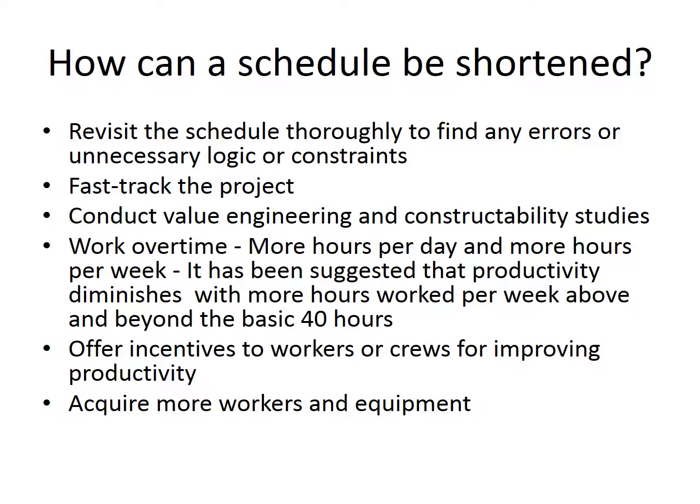If I'm behind schedule, almost invariably it's going to cost money. If I do this maybe in a cost plus contract where I have a financial incentive to work early, overtime and more workers and equipment might actually benefit me in the long run, because if I finish maybe 3 or 4 months ahead of schedule, I don't have to pay 3 or 4 months of people's salaries, or there's no more direct cost to that project for a job site trailer or any of the direct costs that might be involved. So that actually might work to my benefit.